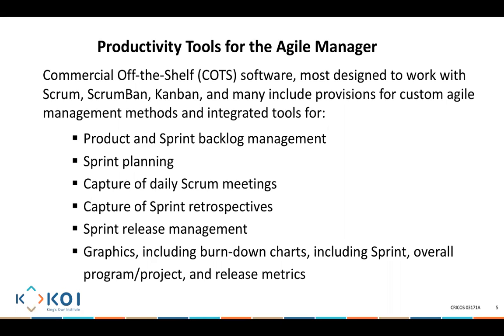Capture the daily Scrum meeting. So the daily Scrum meeting is about any issues, anything we're working on. So if we know, for example, we are working today on user story 7 and I'm working on developing the login page and the logout page, those login page and logout page need to be tasks that are incorporated inside of my plan, inside of my user story. And the reason is very simple, because creating the login page and creating the logout page are tasks that are going to be consuming time.